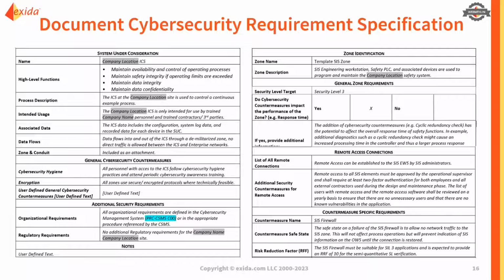It can be used for requesting vendor scopes, can be used as test case requirements and be the start of what you're going to build into, let's say, CFAT and CSAT procedures. And so having this is one really good way to embed those requirements that come out of your cyber risk assessment into projects and into future steps that will be taken.